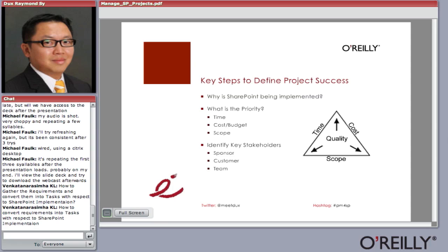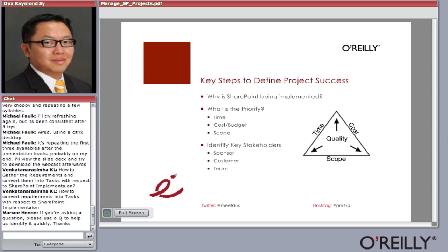So we did that whole analysis in Dynamic, spent 3 months rolling that out because we had to train people this new way of doing meetings. So it's just that one slice, one little thing. And then we defined what kind of benefits, what kind of success metrics they'll get. So what happened? 5 months later, they dropped one T1 line because they had 3 T1 lines in that main office, because they said people just send files all the time. They had to have that kind of bandwidth. So they dropped one T1 line.